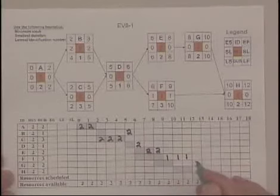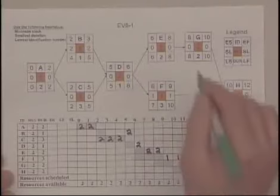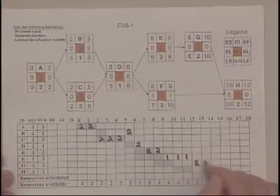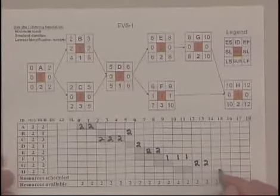Once F is done, we have the two tractors necessary to start G. And then finally, when G is done, we can go ahead and complete H.